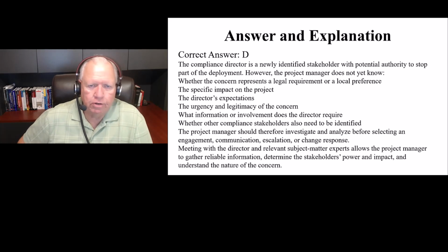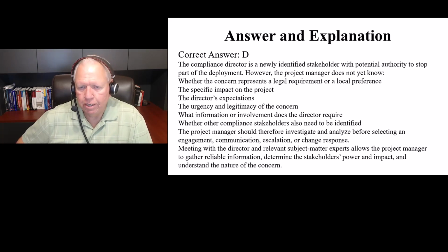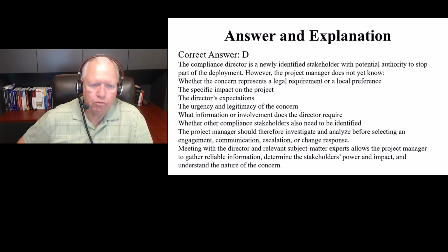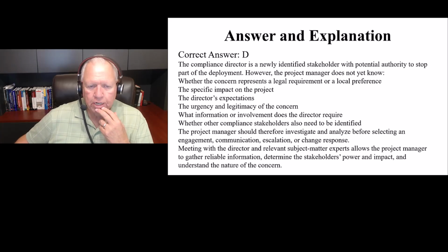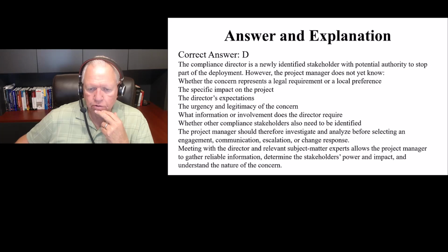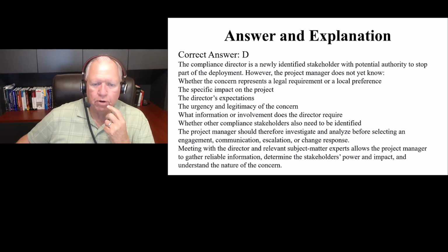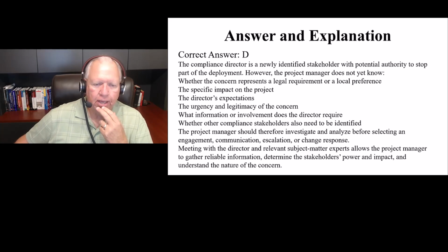The compliance director is a newly identified stakeholder with potential authority to stop part of the deployment. However, the project manager does not yet know whether the concern represents a legal requirement or a local preference, the specific impact on the project, the director's expectations, the urgency and legitimacy of the concern, what information or involvement the director requires, or whether other compliance stakeholders also need to be identified. The project manager should therefore investigate and analyze before selecting an engagement, communication, escalation, or change response.